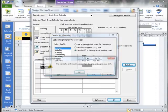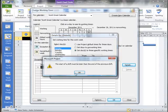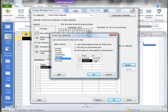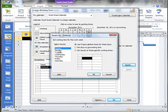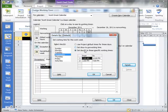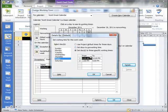Okay, so now if you look at what we have set here for these different days. On Sunday, we're just using the default which is no work. On Monday, we've overridden the default to specific work times. On Tuesday, we've set it to non-working time. On Wednesday, we've overridden the default, set it to this longer day. Thursday, once again, we've set to non-working. And Friday, we've set to this longer day.